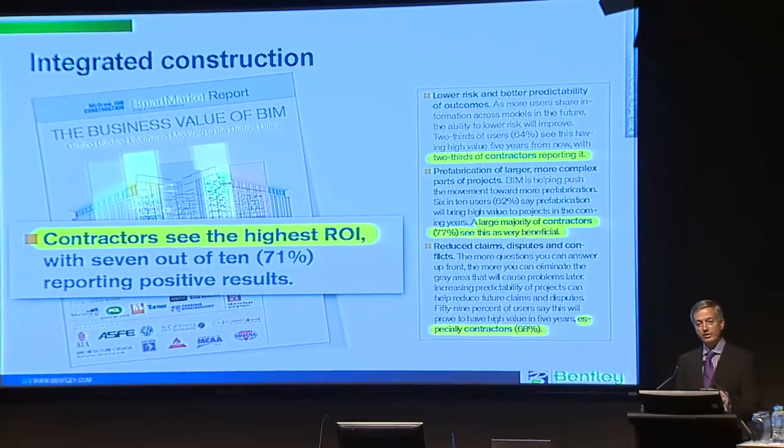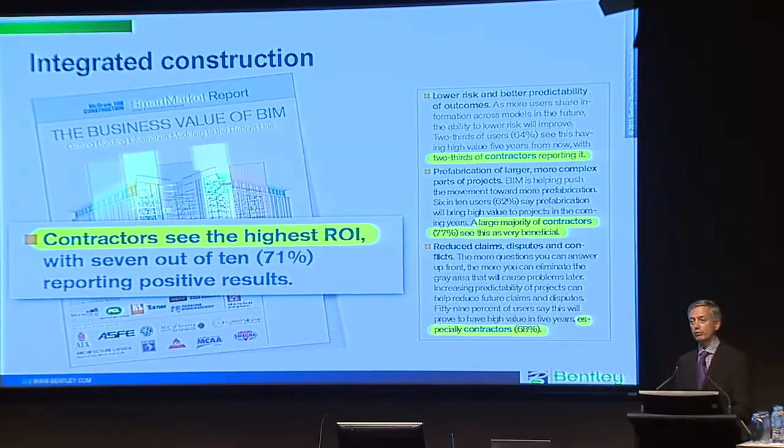Now, when you think about that, that's 3 to 4%. So a $100 million project, we'd spend up to $4 million just taking someone's 2D design and creating it in 3D. And it was purely for clash detection and coordination. We never passed it on to anybody else. It was kept purely internal. And we did that because we knew, and as we've seen examples here today, it saves many times that in terms of savings and less time on site and more efficient processes.